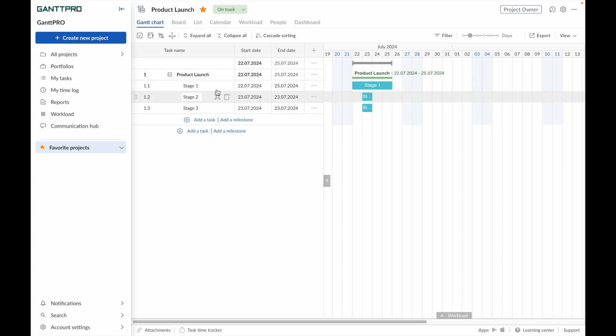What you see now is called a task group. The start and end dates of the summary task are calculated automatically based on the subtasks.